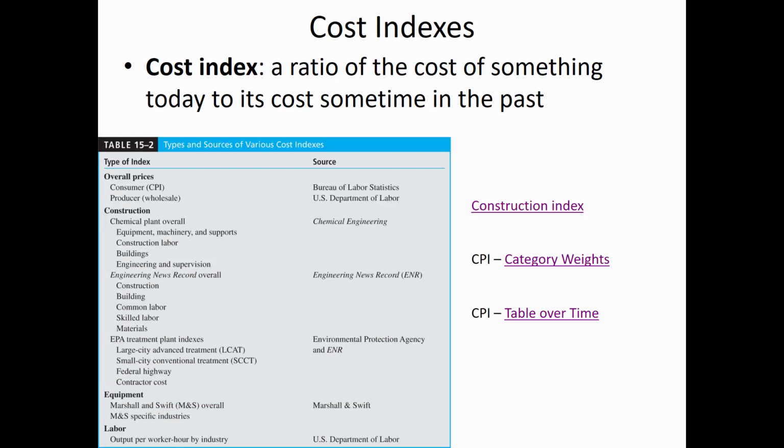And if we're using this type of information for generating cost estimates, there are a lot of sources that are specific to engineering projects. You can get the cost of construction materials. You can get the cost of labor. And so here are just some sources that are mentioned in the book where if you want to get different types of cost data, the different sources that are available that you could use to make a really accurate and detailed cost estimate, and not only detailed, but also projecting it into the future by looking at how much those costs changed in the past.